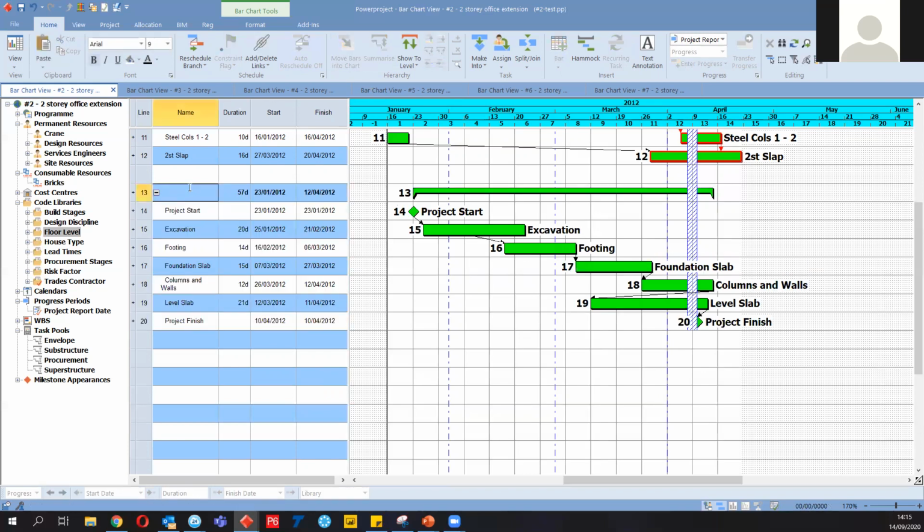But before that, let's select all these activities and put them in a hierarchy. So this will be our macro phase 1, let's say. Okay, so this can be our work breakdown structure, which we can create after the creation of the activities. We don't have to determine the work breakdown structures first. We can directly create them after creating our activities.